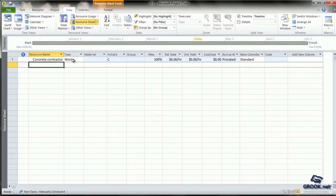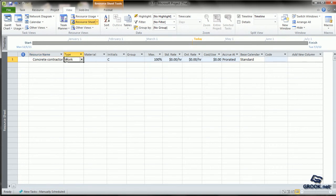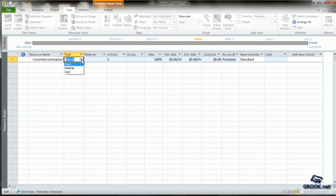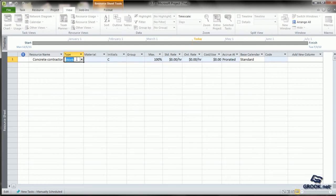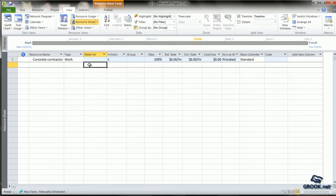If you look at the row, you will see that there are a number of columns in which entries happen automatically. If you go to the type, you will see that work is selected by default. If you click on the right arrow here, it shows that there are options like work, material and cost. Since a contractor is a work resource, we leave it at work.